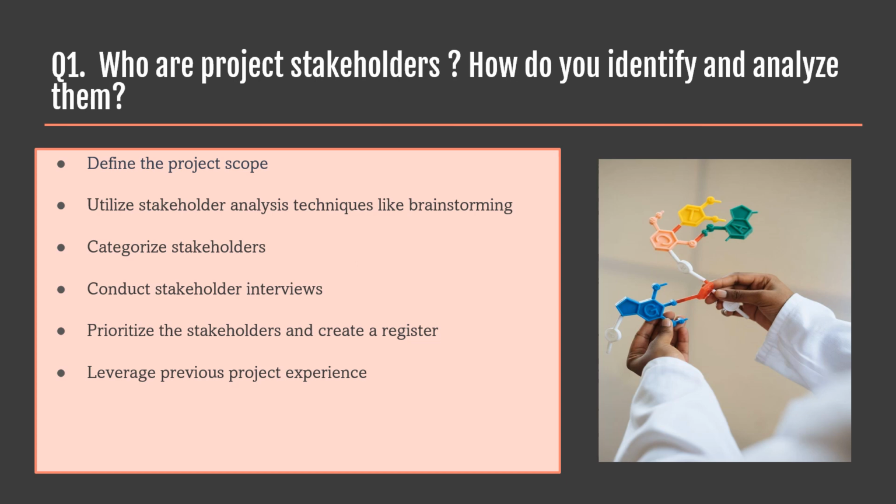She conducted stakeholder interviews to understand and analyze their needs, expectations, influence, and potential impact on the project. Tools like Stakeholder Analysis Grid or Matrix helped her visualize this information. Then she prioritized stakeholders based on the above information and created a registry for the same. We can also identify and analyze stakeholders by leveraging previous project experience.